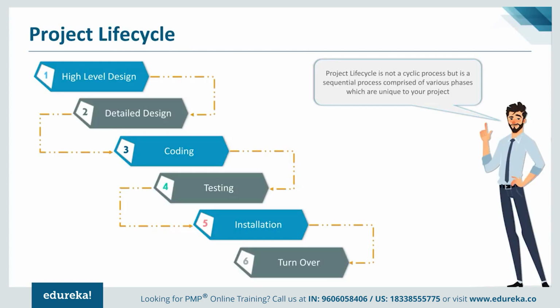When we talk about some of the basic fundamentals in project management, we also need to understand project life cycles. Now, the project life cycle is certainly not a cyclical life cycle, but a sequential life cycle. Typically, whenever we begin working on any project, we always perform some initial project activities. So right from identifying an opportunity for the project, a business case will be built. And once we have a business case approval, then your sponsor, who has some funds approved, can allocate that fund to the team, to the project manager. And obviously, that's how the project journey starts.